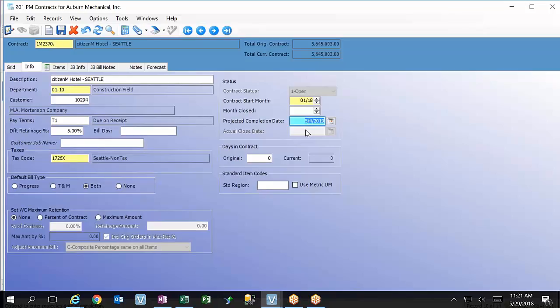You probably never get them, but is it part of your contract? They're in all our contracts, yeah. Typically. So in order to track, you would put so many days in contract on the original contract, and then it would track those days. The current would be change orders, right? What is that, Justin? Liquidated damages. Oh, yeah, okay.